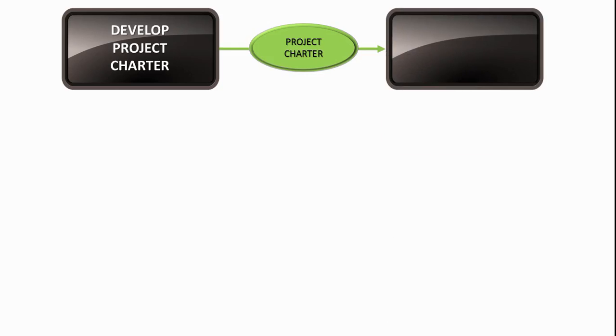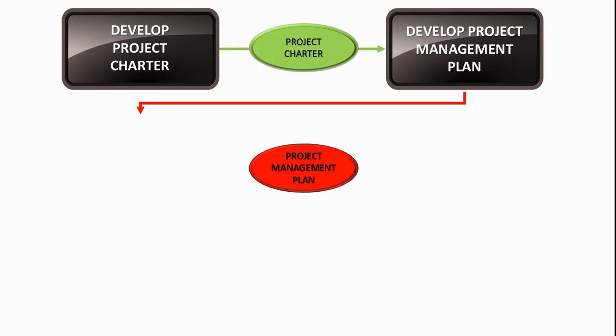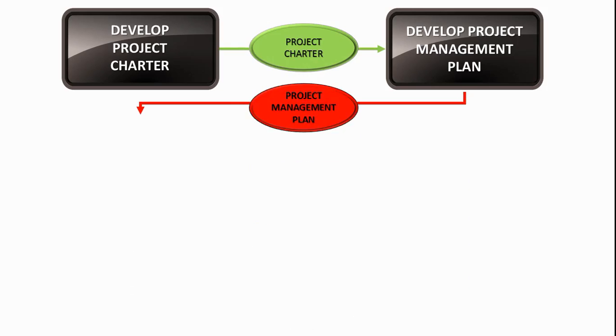Your project charter becomes an input to what happens after it within integration. Within integration, it's the project management plan that comes next. So to develop your project management plan in this process, develop project management plan, you need to have a project charter because your project charter is the foundation. And then you're going to build on that foundation and you're going to get more detail about what needs to be done to get to your goal in the project management plan. Now, the project management plan is the output of this process, develop project management plan.